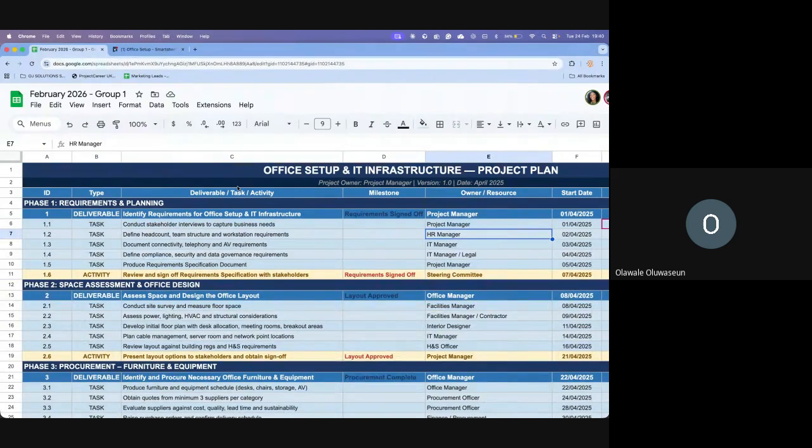Because you're not setting the reference properly, it doesn't realize what you're saying. You're saying the dependency is its own self. So maybe it's line 3 and you're typing 3 in the predecessor column on line 3. So it's like, I don't know what you're talking about. That's why you're seeing REF. Okay, thank you. No worries.